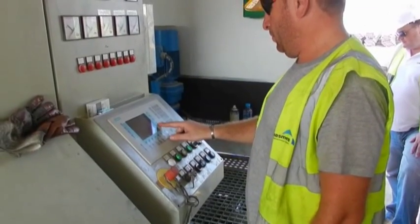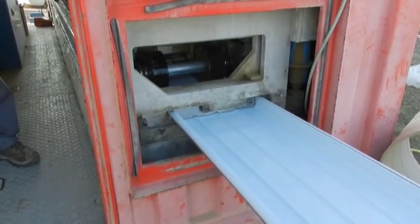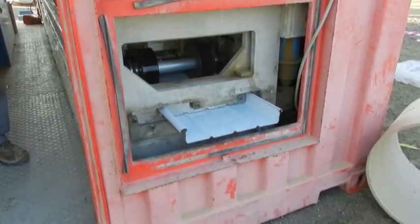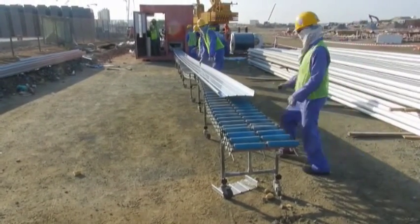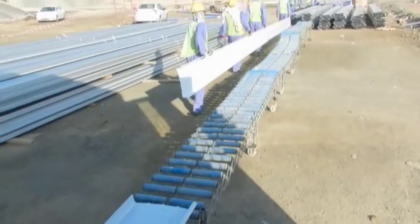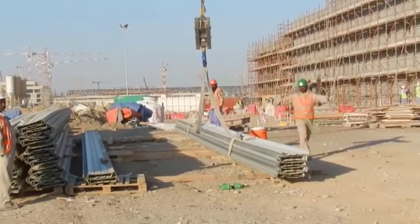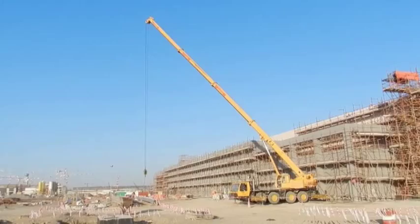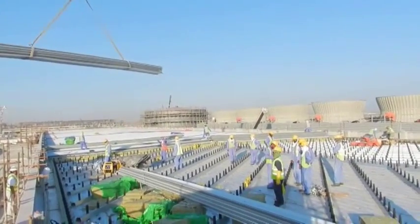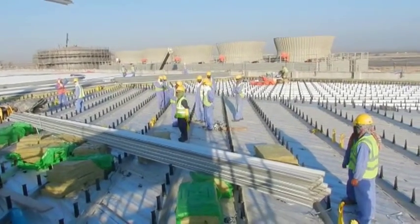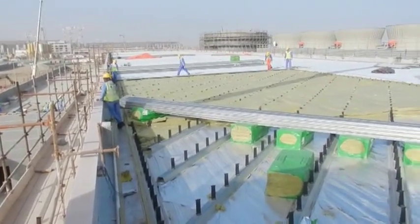The clips will hold the vapor barrier in place. All vapor barrier laps will be sealed with butyl tape. Once a substantial area of clips and vapor barrier has been installed and inspected, the insulation and top sheet can commence. The top sheet will be manufactured on site from coils using a roll forming machine that is contained in a 40-foot long ship's container. The roll forming machine will be located beside the buildings at ground level. The top sheets will be rolled and cut to length and bundled for crane lifting. The roll formed sheets will be lifted onto the roof by crane, using a lifting beam for longer lengths outside of the capacity of normal chains and slings. The packs of sheets will be stacked ahead of the location required.